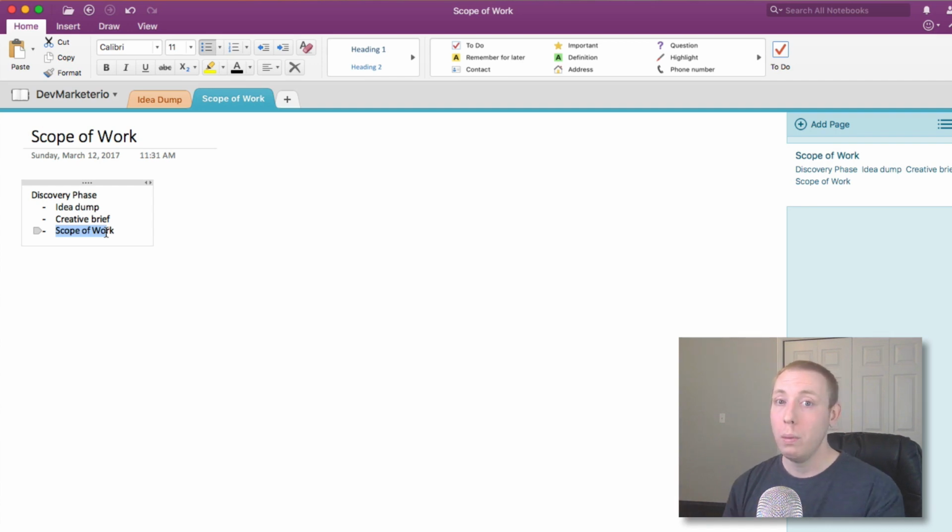That way, 2 months from now, when they wanted to tie into some API that you didn't tie into, instead of you having to go back and have this revision and fight with the client, saying, I didn't understand that that's what you wanted, you never really told me, and them saying, oh yeah, I did tell you, now you go back to the scope of work because you have that, and you can say, hey, it's not in the scope of work. You didn't mention that when we signed the scope of work. And it makes for a very easy conversation.